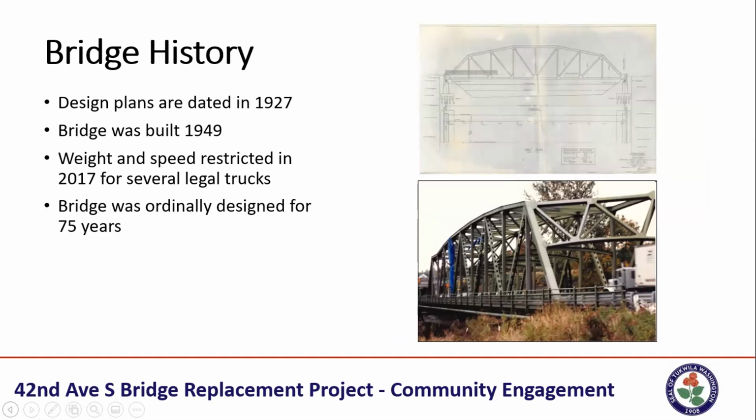Following a new load rating that was done on the bridge, it was found that it had to be load restricted for several of the legal trucks and vehicles. AASHTO design life for any bridge is 75 years, AASHTO being the guidelines for design of bridges, even though nowadays we design bridges for 100 years.